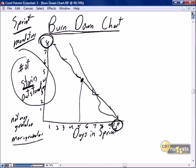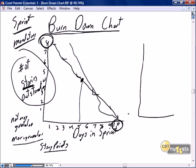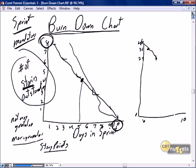So what do we mean by more granular? Instead of tracking the number of stories, let's track the number of story points. Now instead of tracking from one to eight, we're probably tracking from one to around 40, still going from day one to day ten in our sprint. We would absolutely expect that on day one we've completed a story point or two — so at day one we're down to 36, and at day two we're down to 29. We're beginning to see more direct value.